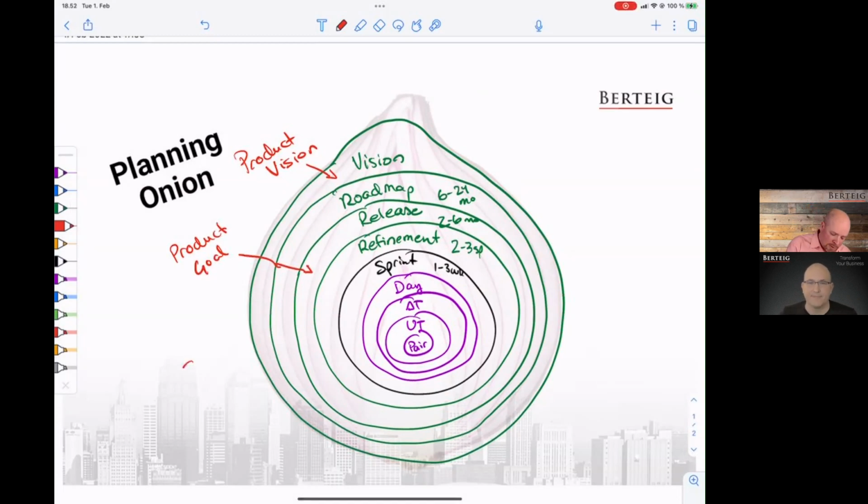And the last one is the sprint goal. And that's obviously connected with the sprint. So here we can use this as sort of like a sum function. Product goal is a sum of sprint goals. So when we think of a product goal and we think about planning at a sprint level, the sprint goal should basically tell us a story, how we intend to deliver the product goal. What is the flow of development and the purpose of each of these increments in achieving the product goal?